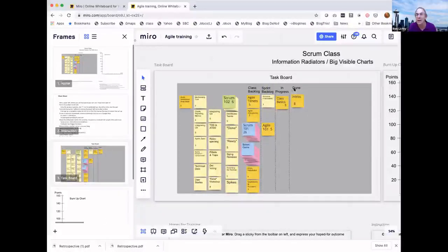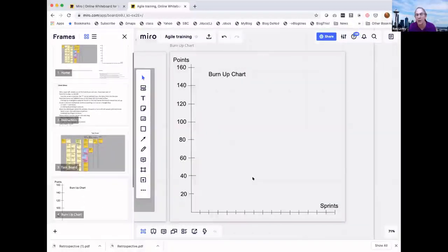Each of those stories has story points, and I do the arbitrary thing of using sprints that are an hour long. So at the end of an hour, we can update the burn-up chart with how many points we basically burned in the course of an hour. So we end up getting that burn-up chart very much like the one that we saw.